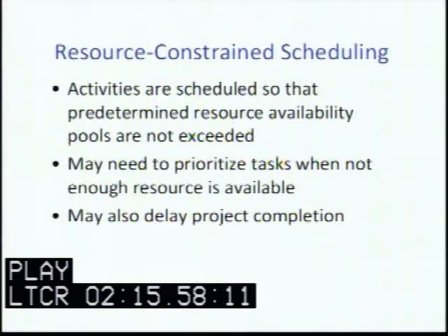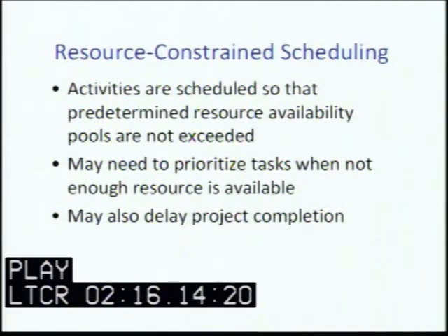Another technique related to crashing is resource-constrained scheduling. Here we're looking at the activities that are scheduled so that the predetermined resource available pools are not exceeded. For example, we might have a group of developers that will be available. How can we organize the activities so that we don't exceed the number of developers that we need on a project? Again, a type of analysis to look at when we want to manage costs.